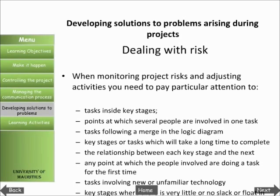Key stages where there is very little or no slack or float in the schedule. When a risk becomes reality, its implications must be assessed, including the effect on costs and resources, possible consequences if the problem is not addressed, which aspects of the project are affected, and how serious the problem is thought to be. Depending on the reporting arrangements you have in place, you may need to notify your sponsors of any problems immediately. It is more likely, however, that you would want to identify possible solutions first, so that you can make recommendations for action at the same time.